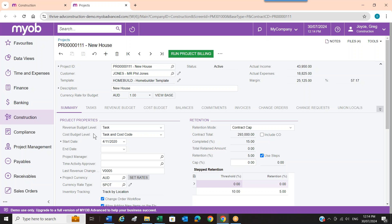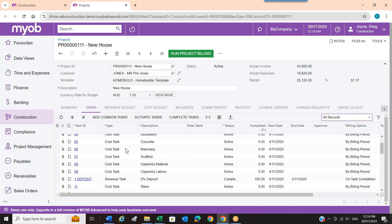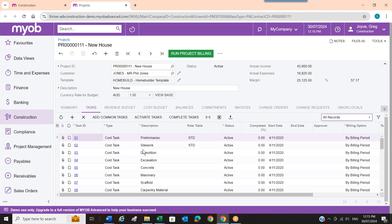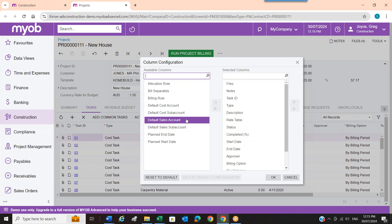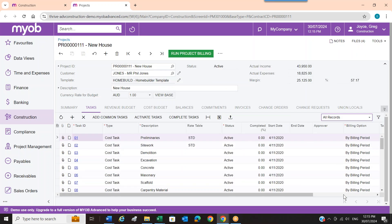When we go into a project, we need to put in tasks. You can have a cost task, a revenue task, or a cost and revenue task — which is useful if you're working on a bill of quantities where revenue and cost codes are the same. In all these grid areas, I can click a small icon to add or remove columns and customise what the grid looks like. If you don't want a column, remove it; if you want to add one, add it.